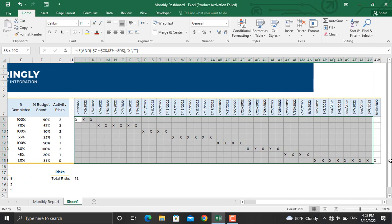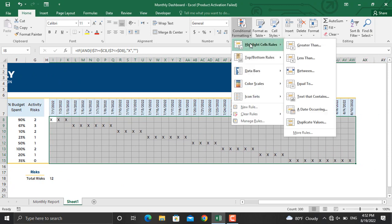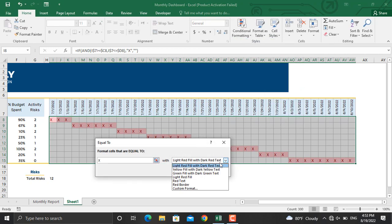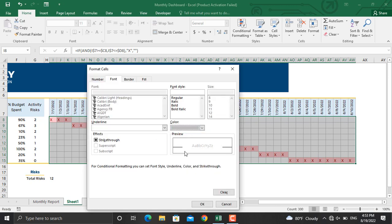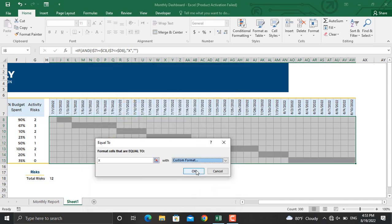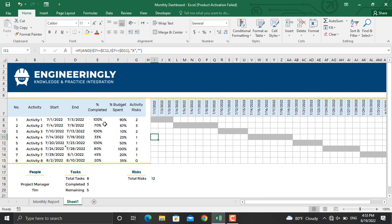Next, select the Gantt chart area and go to Conditional Formatting. Click 'Highlight Cell Rules' and then 'Equal To.' If the value in the cells is X, we will apply specific formatting — the font color will be gray and the fill will also be gray. Click OK. The Gantt chart will now be prepared and displayed.